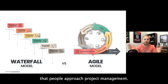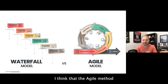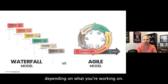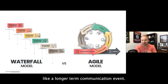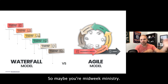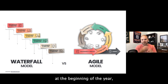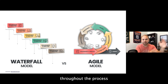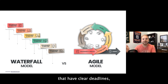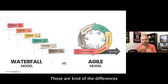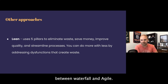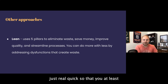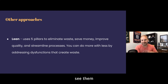Here's a visual comparison of waterfall versus agile. In the waterfall model, you look at requirements and analysis, then move to the next step — sequentially. In agile, you look at requirements and analysis, but then also design, implement, and test — then go back, evaluate, analyze, make changes, and eventually launch. The agile method has validity in church communications depending on what you're working on — for example, a midweek ministry you promote at the start of the year but adjust your promotion throughout the year. Other ministry events with clear deadlines are more like the waterfall approach.